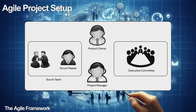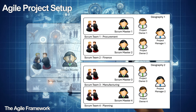One way of setting up your project team is to consider the geographical spread, where each country can have its individual Scrum teams and project manager. After the geographical build is complete, the team can start integrating the multi-geography aspects of the project based on the global roadmap. You should consider several factors for this approach, such as local requirements, solution feasibility at the local level, and the global rollout roadmap. Another approach, specifically for greenfield implementations, is to follow the path of sunsetting the client's existing infrastructure or legacy ERP systems. If a certain legacy ERP system is retiring — for example, where the client has hosted their financial system — then you can target that system first.